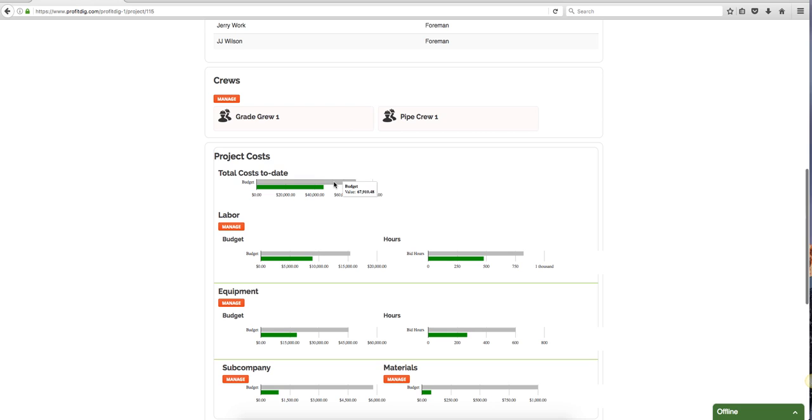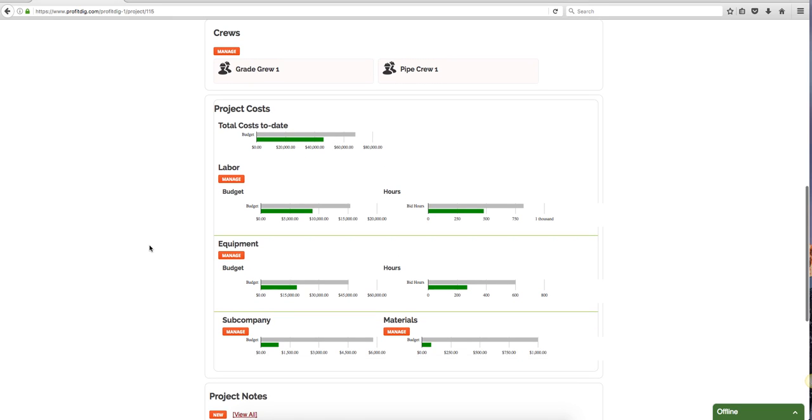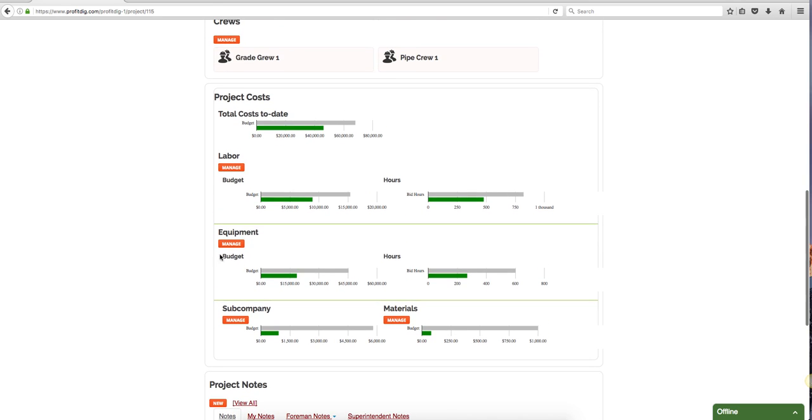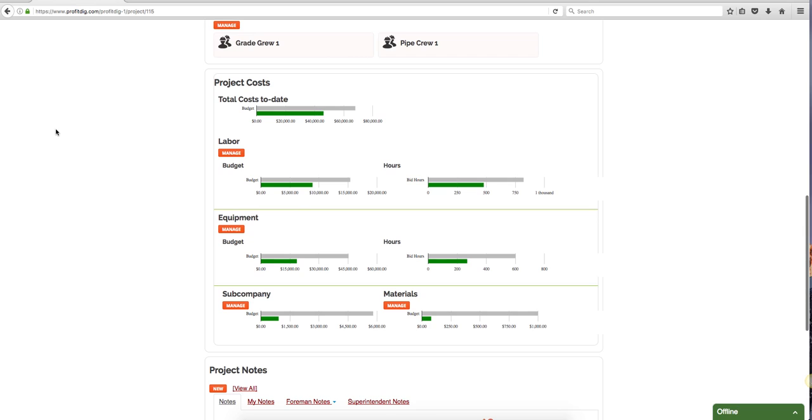Now here's the really good part. I can also see here's my budget based on my proposal. I had a budget of $67,910.48. Every day if I go in here and I log my employee time or I put my equipment hours in - let's say I had to write a check to a sub company or I had to buy materials, whatever the case may be - if I enter this information every day, this will give me an up-to-date profit and loss statement on every job throughout the process. So now there's no excuse for me getting knee-deep in a project and wondering, oh my god where am I at, where's my profit margin, how soon do I need to get this done. Now I know all I have to do is log in here and it's going to tell me exactly where I'm at on the job.